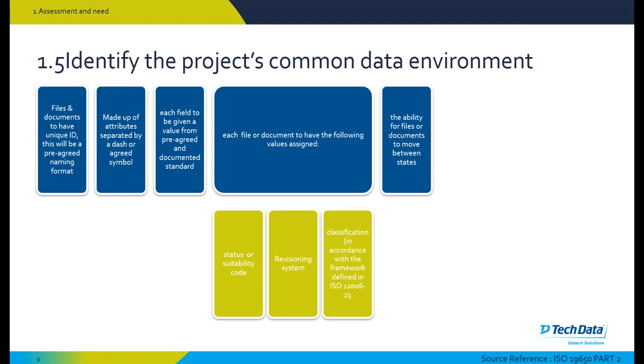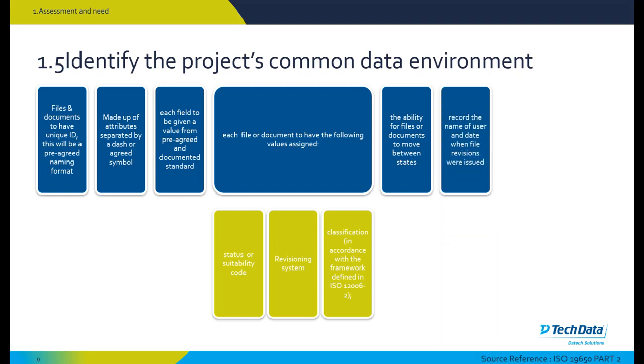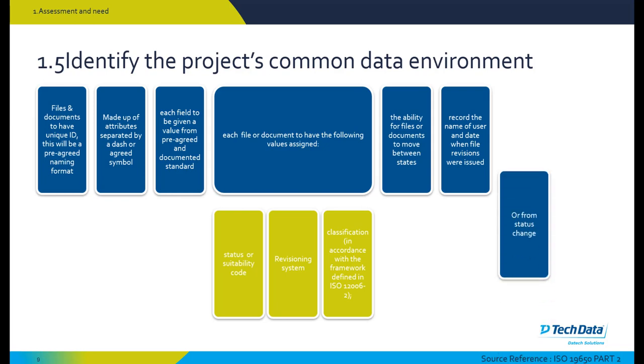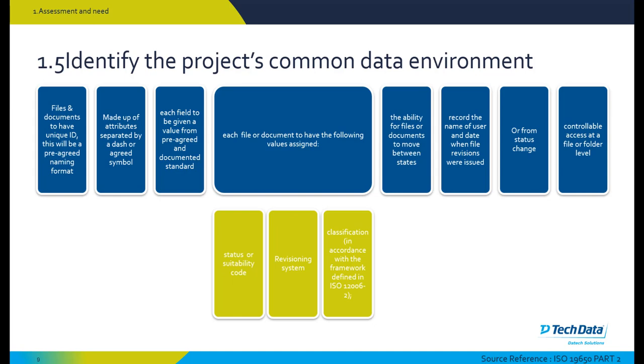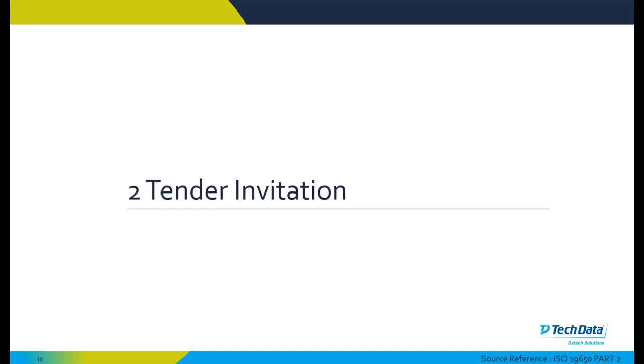The ability for files or documents to move between states is also a requirement of a common data environment and record the name of the user and date when file revisions were issued or from a status change of a document. This needs to be controllable access at a file or folder level, which BIM 360 gives us controllable permission access at a folder level.